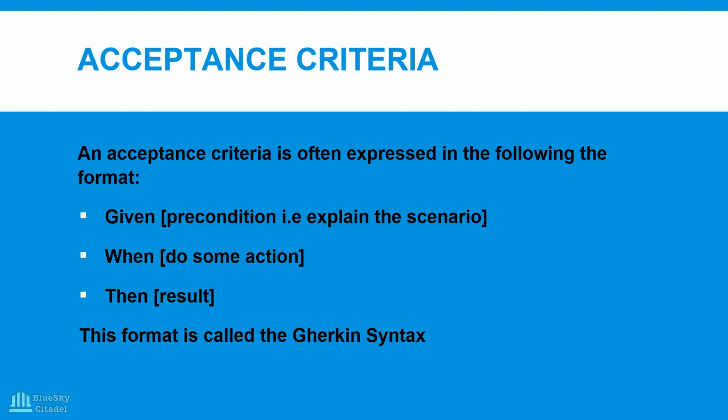I've written stories where we've gone into refinement, and you're saying given and when and then and, so it might not be that straightforward, but let's keep things simple. This is the basic format, right? We are talking about the Gherkin syntax: given, when, then. You give a precondition, given; so when, what's the action that's going to happen?